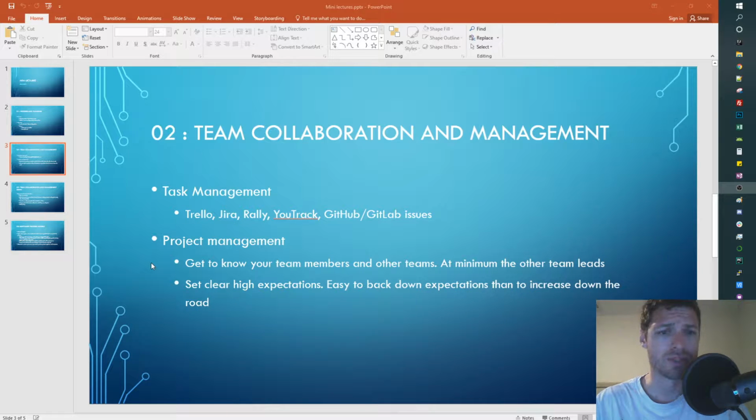Sometimes, depending on the project, if it's a very large project, like the project I'm working on, True Course has around 200 people. We have these end-to-end capabilities, and we have to break them down into an epic hierarchy. An epic is a very large thing. Then it's broken down into stories, which are then broken down into tasks. So you can think of an epic as part of a website, like being able to log into a website. There are many pieces to that.